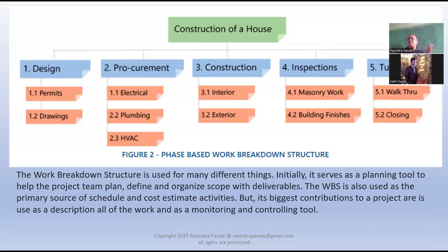No, tracking is where we have a project plan. That's Microsoft Project or Jira. There we have tasks and a number of days, and basically it can come out of a WBS also. Even Jira allows you to take your Excel. If you make the WBS in Excel, you can import it into Jira or Microsoft Project so that you have the basic task structure created, and you can just apply the schedule there. So WBS is just a work structure or estimate.